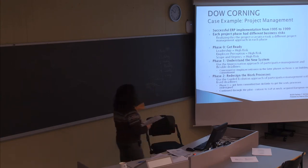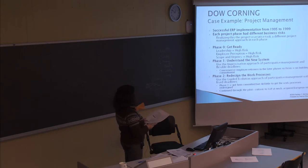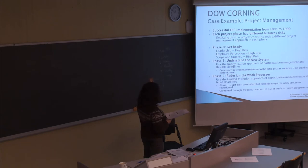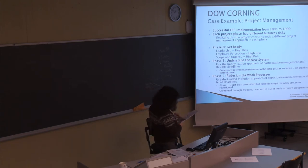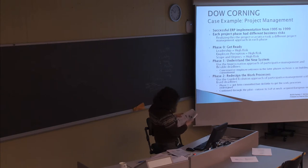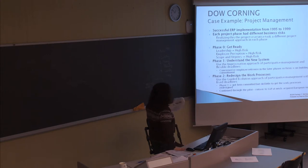There was also a case in the book about Dow Corning, talking about the implementation of a new system. In different phases of the project — initiation, planning, etc. — they had different types of risks; it wasn't the same at every phase. At phase zero, leadership was high risk, employee perception was high risk, and scope and urgency were high risk. They used different approaches for different phases.